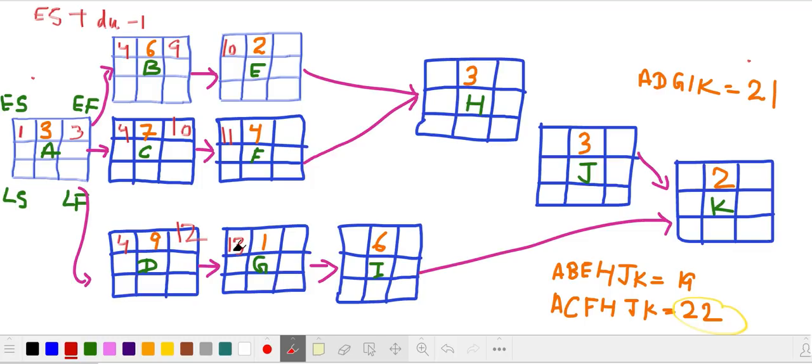Now a twist is about to come. So 10 plus 2 minus 1 is 11. 11 plus 4 minus 1 is 14. I'm gonna do this one too, it's 13. After 13, it's very clear that 14 would come, but what's gonna come over here? Because after 11, 12 comes, but after 14, 15 comes.